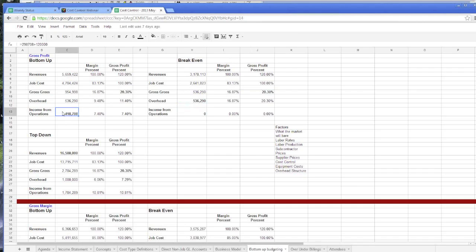But anyway, what am I bidding toward? Let's say we're going to do over $5 million at 20%, and our overhead. So, a little less than $5.5 million times 20% is $950,000. Overhead's $500,000. So I'm bidding to make $400,000. So looking forward, what am I bidding to? What's my bottom line I'm bidding to? So that's a valid concept. Very simple computation, right? So we'll talk about that.